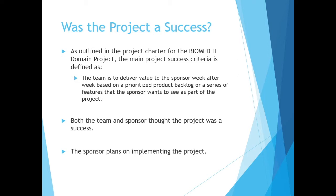As outlined in the project charter that we originally came up with for the Biomed IT domain project in the A class, or class 1 of this capstone project, the main project success criteria was defined as the team delivering value to the sponsor week after week based on a prioritized backlog or series of features that the sponsor wanted to see as part of the project.